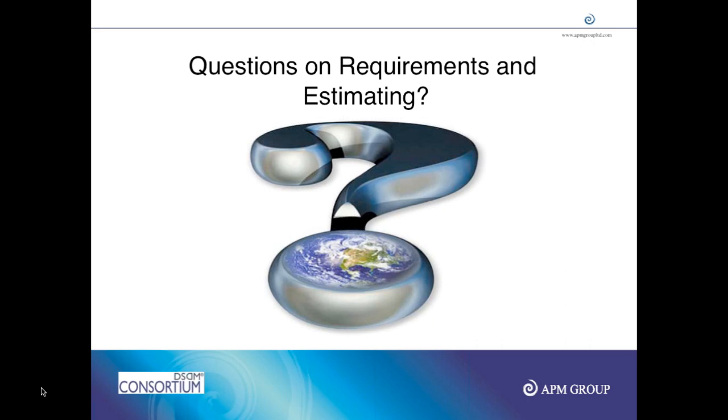So if there is any impact on a must have, like I can't deliver this must have within this time box or within this increment, then the ambassador, the team, should inform the project manager, who involves the visionary to see what to do with this problem.